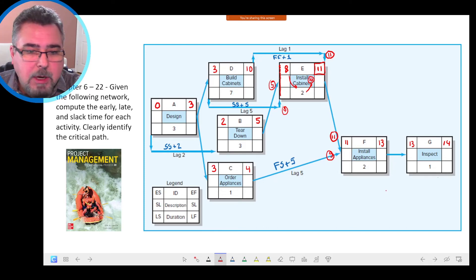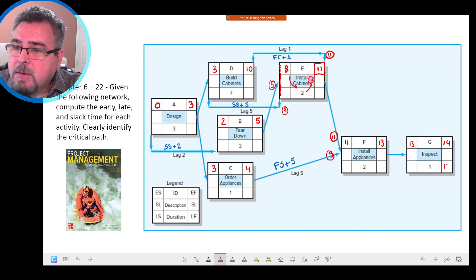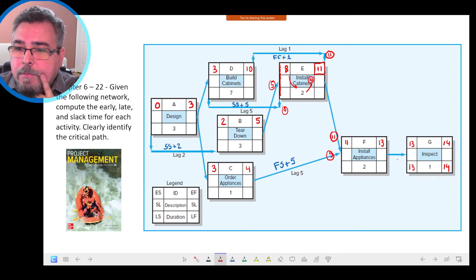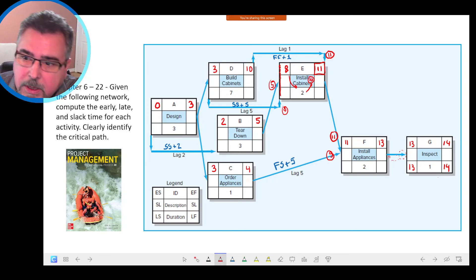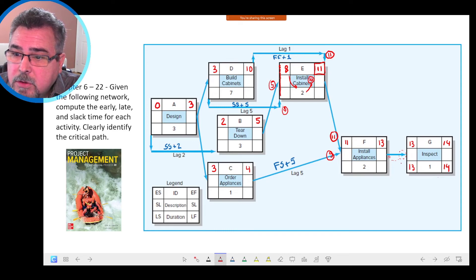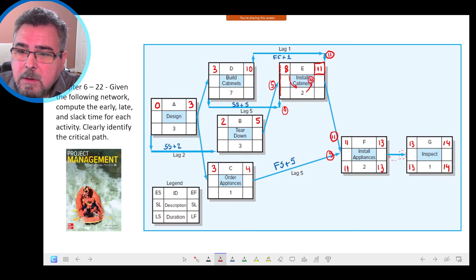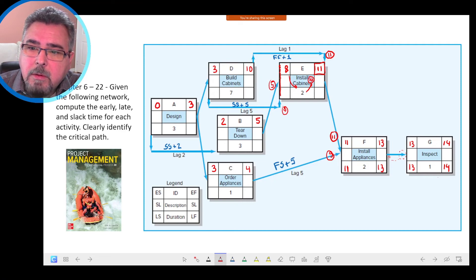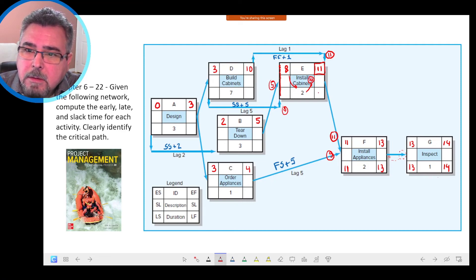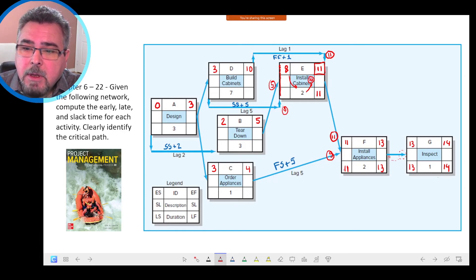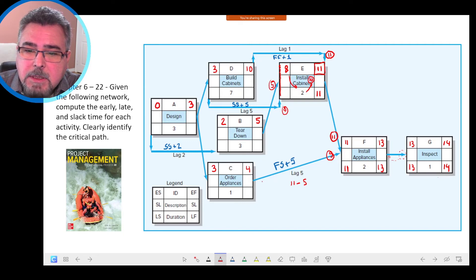Now let's do the backward pass, starting with 14. In the backward pass we start from the arrow tip back to the beginning. So 14 minus 1 = 13, and because it's Finish-to-Start, the late start of the following activity becomes the late finish of the predecessor: 13. Then 13 minus 2 = 11. Between F and C it's Finish-to-Start with a lag of 5, so 11 minus 5 = 6. Then 11 minus 2 = 9 for Activity E. Moving 9 backward to Activity B through the Finish-to-Start relationship.